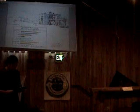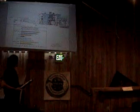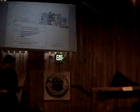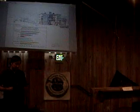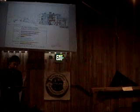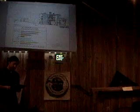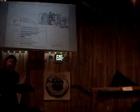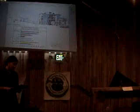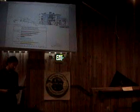So I can take you a little bit through the process here. These ones are kind of tough. It kind of starts out in the design phase, kind of like any other sustainable process, reviewing options with the client, reviewing energy modeling. We had a sustainability consultant throw some ideas at us. We finally decided on Green Globes. There is a $1,000 registration fee.